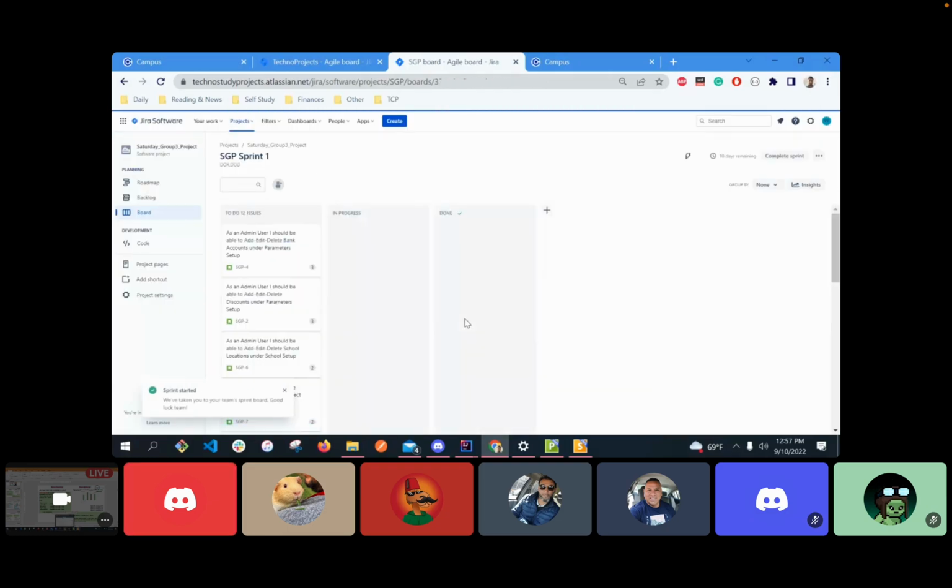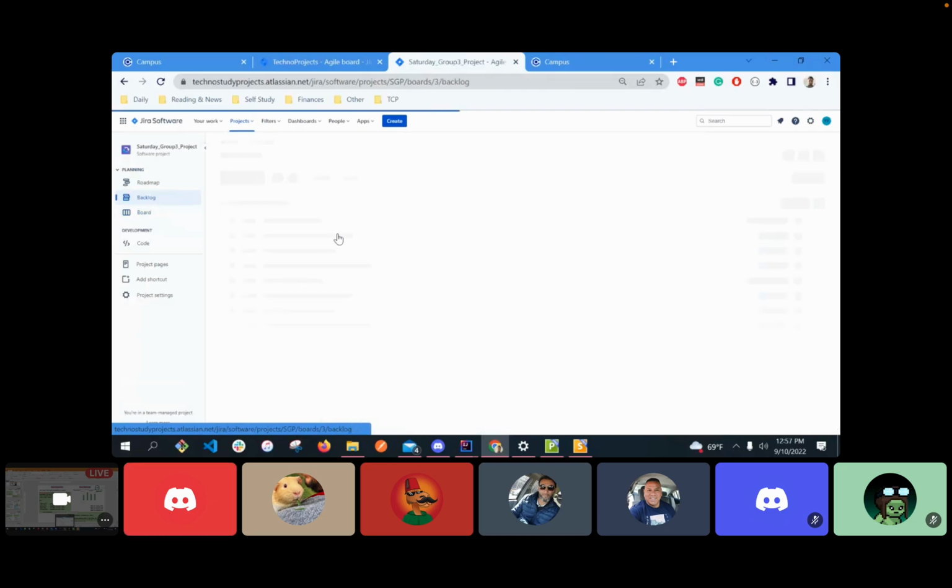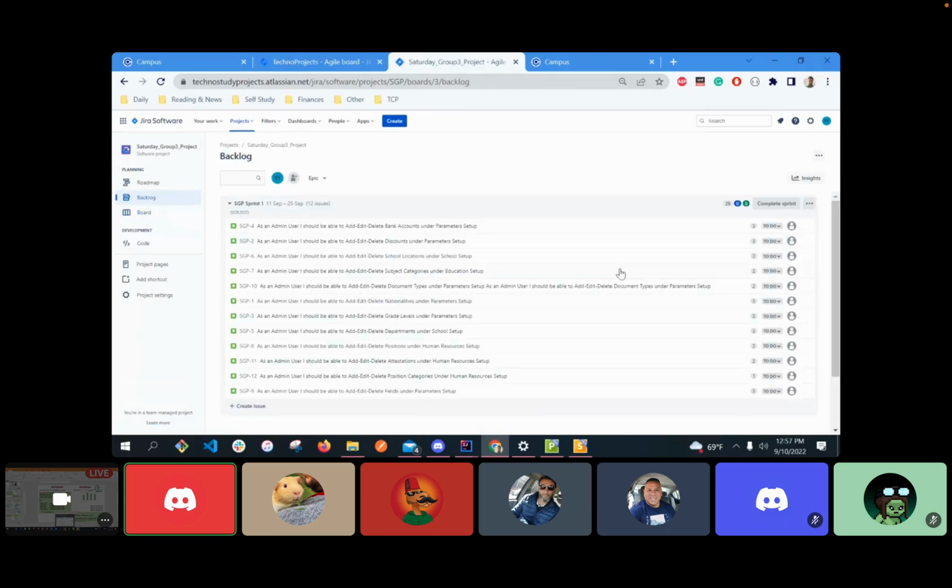All right, sprint started. So I'll tell you this before you go to your questions. We start our sprint, all right? As you see, our sprint finishes September 25, and it starts 11 tomorrow. And the points to cover are DOR and DOD. Do you guys remember what DOR means? Definition of ready. Definition of done. Yes, definition of ready. Stories are ready. You already checked. You already cleared your mind on what you're testing and what you're working on in the stories, and DOR is ready, and we move to sprint planning, and we're done with that part. But we haven't done DOD.